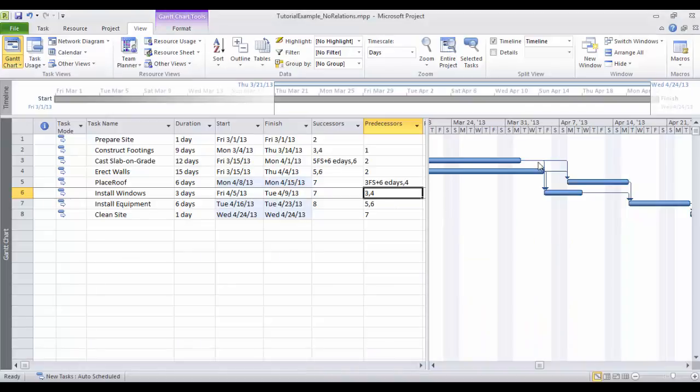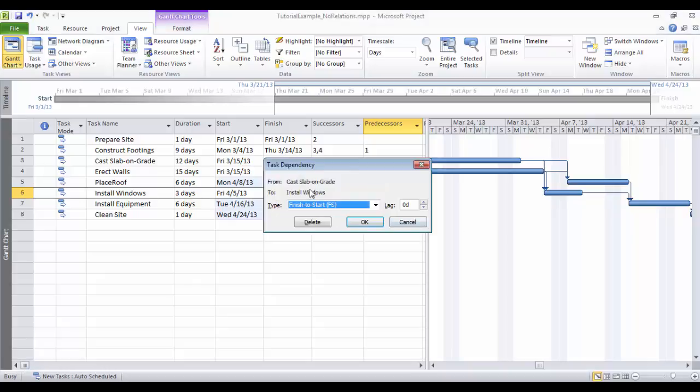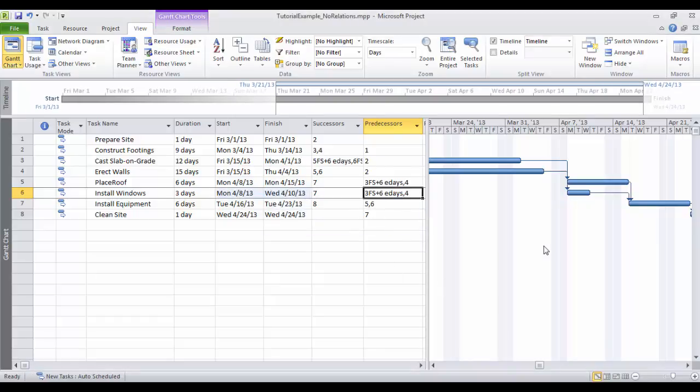So now going to 3 and 6, you need to be careful now which link to pick. So I think this is from 3 to 4, 5, 6. This is 6, so this is the link. And just to make sure it is from gas slab and grade 2 is still Windows, which is 6. So now I need to write it here 6 ED, 6 elapsed days. And then this is the chain tab.